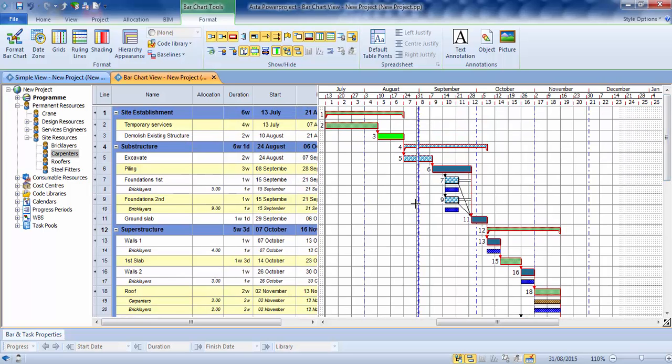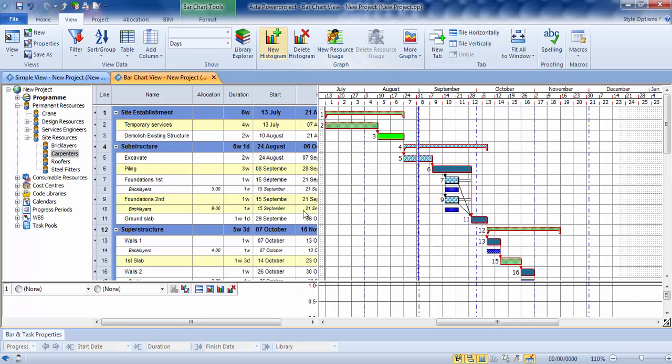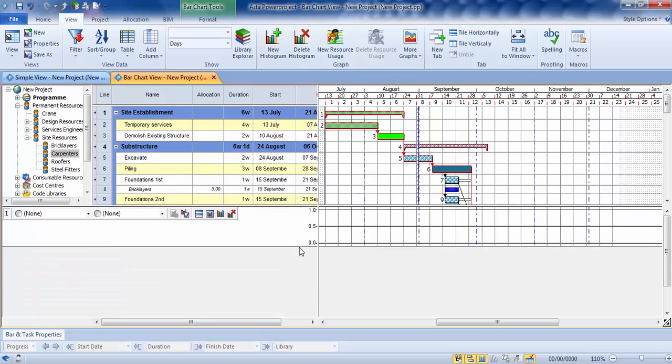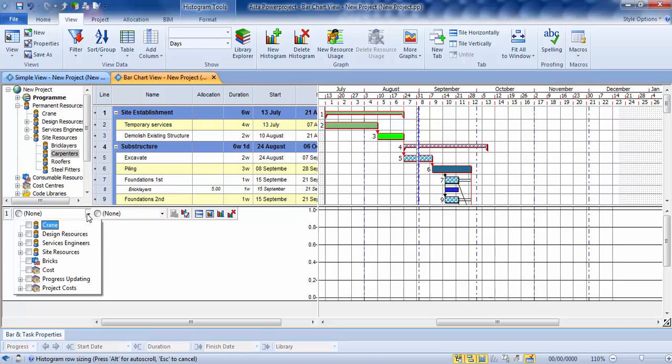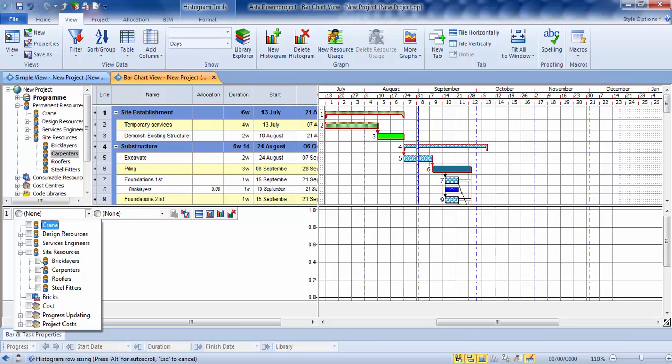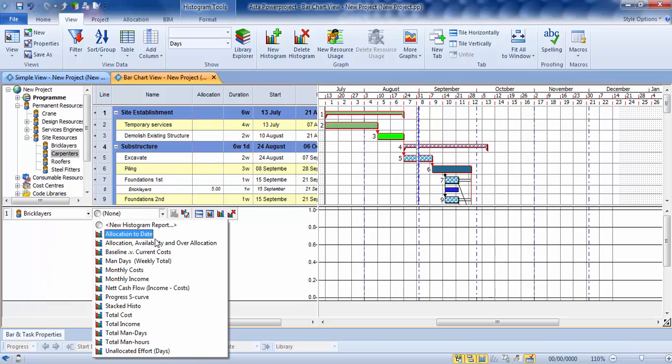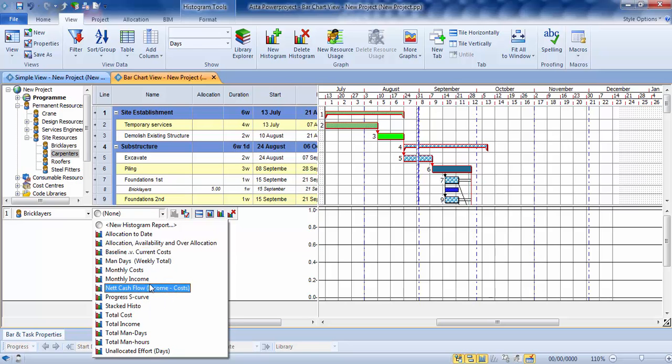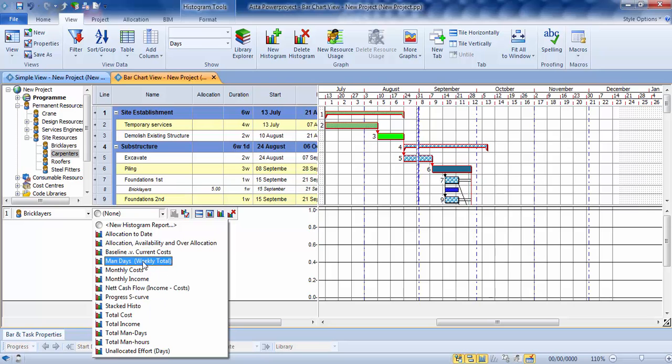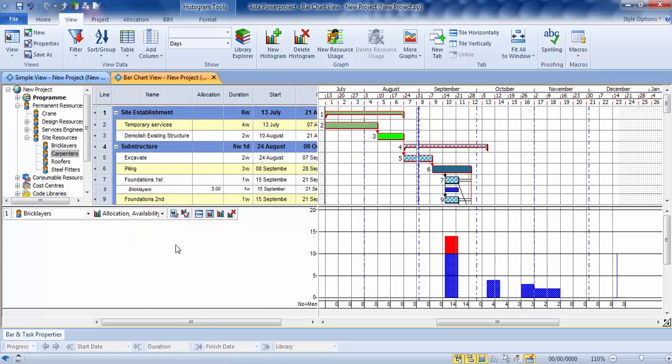Once you've done this and assigned your resources across to your program, you can then on the view tab at the top, create a new histogram. We'll picture the histogram at the bottom of your program. And with the two dropdowns, you can choose who you want to graph. So we'll open up our site resources and we'll do our bricklayers. And we'll use our allocation availability over allocation. You can see there's a number of graphs which actually come with the software. So you can choose any of these to see different information. So if you want to see man days, you've got costs, which we'll be looking at shortly. Total man days, total man hours. But the one I'm going to use at the moment is the allocation availability over allocation.